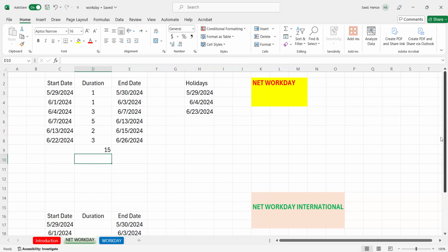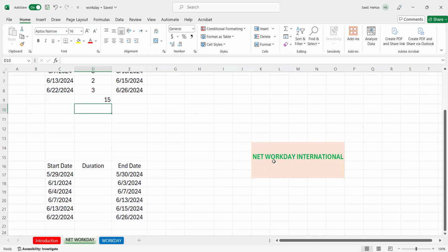Here I need to consider the time zone by applying NETWORKDAYS.INTL. In NETWORKDAYS.INTL, I'm going to include the time zone, or the off day dates for my work. For example, in the United States, Saturday and Sunday are off days. There is no work in this time. Other countries have different weekends. What I'm going to do here is apply NETWORKDAYS.INTL.